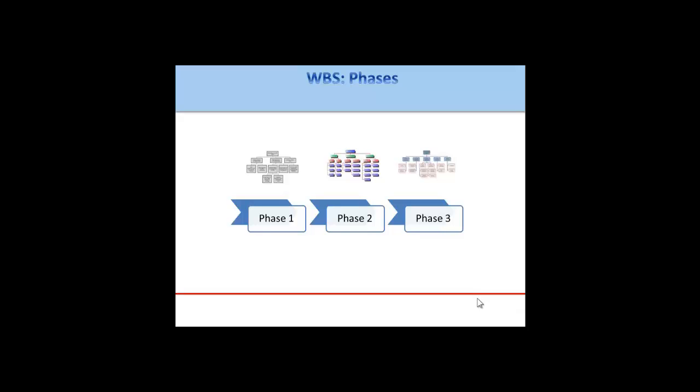I've deliberately put in 3 different work breakdown structure images here. Don't worry, they're very small. They're not designed to be read, just to illustrate the point that you could do a specific work breakdown structure for each phase. And it will be different. That's good, because it means we're thinking about how to make the work breakdown structure work for the phase. We're starting with our deliverables in the phase, instead of our outputs, and we're breaking down from there.